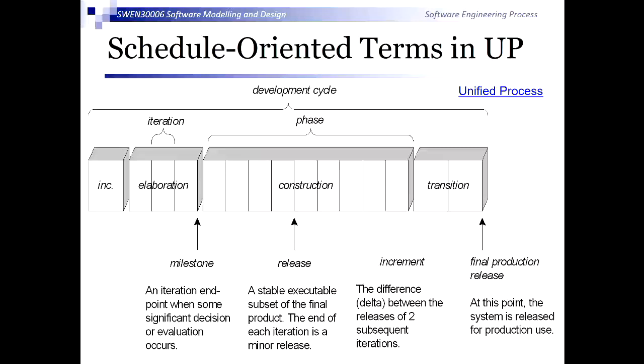So we're taking what we've decided in the first stage, in inception. We're now trying to minimise the risks of the project to make sure it's going to be successful, and we establish the architecture in that phase. So by the time we get to the end of the elaboration phase, we should know what our system architecture is. And then when we come to this construction phase, we're really filling in all of the capability of the system into a defined architecture. And this should be a minimal risk stage.